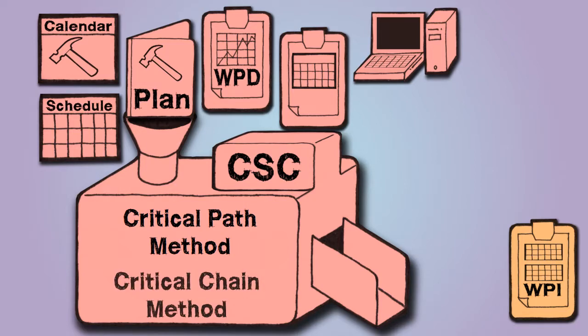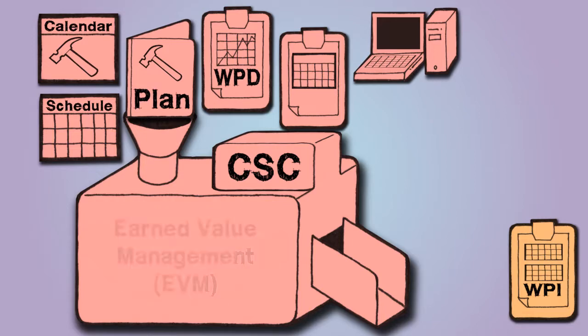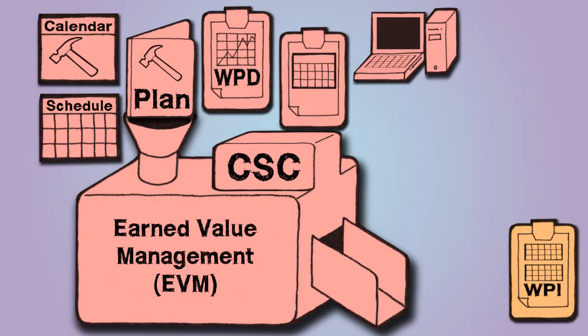The critical chain method can also be used during the control schedule process. The project manager can keep an eye on the buffers in the critical chain activities for any indication of slippage. This can be done by comparing the planned amount of buffer against the remaining amount of buffer assigned to a task. Earned value management is used during the schedule and cost controls.